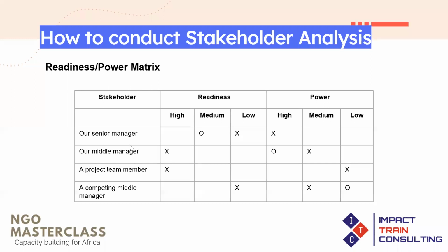By the time you've identified each of the stakeholders on your stakeholder table, you can still use them in this situation. The reason I asked this question is we had a project that we ran in a particular community where we had involved women and youths. It was a conflict community, and most of the people had to leave the community. So, in the course of selecting the stakeholders, we had selected the youths. But in the middle of the project, we discovered that the youth leader of the community that resides in the community was not part of the selected youths. Rather, the people that were selected had themselves selected somebody as the youth leader.